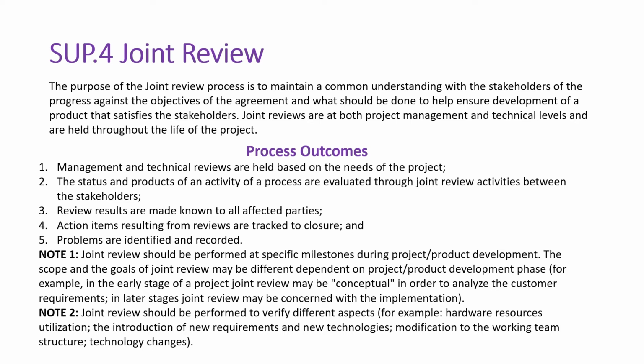So in a nutshell, if I put all these process outcomes together, your joint reviews are pre-planned, at a particular interval. Every week or every month you will have a status report to know your project management activity status or the reviews. In some critical projects you might even have them daily. You will have time blocked with your client to understand the requirements or to do this joint review activity.